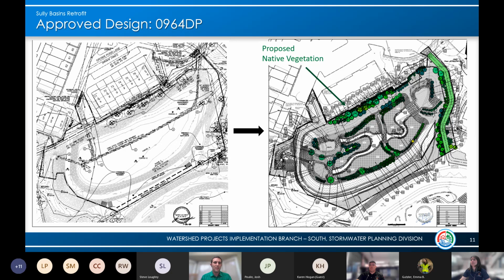the safety fencing, the construction entrance, as well as some tree removal, and then eventually you'll see the heavier equipment coming in. The way we're assuming, there will not be overlap; each one will be done in order. Again, the first one you'll see sometime in the next week or two, and assuming things stay on track, we'll be out of that first pond into the next one by the beginning of August or so, and into that last pond hopefully by the end of November, beginning of December. And again, the plan is to have this project completed by next spring.